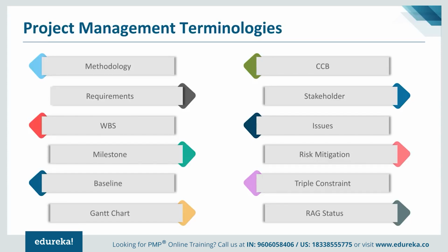So you basically interact with all these people, and while doing that, you'll be using various techniques. You will do prototyping, wireframes, facilitated workshops, interviews, and surveys. All these things you will do to gather requirements about the product you're working on. And then you create a requirement specification document.